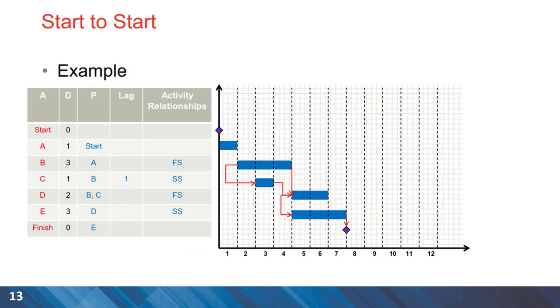Here is an example, a simple project with five activities, and there are two start to start relationships with a gap. The finish milestone shows that the completion time for this project is at the end of the seventh time unit.